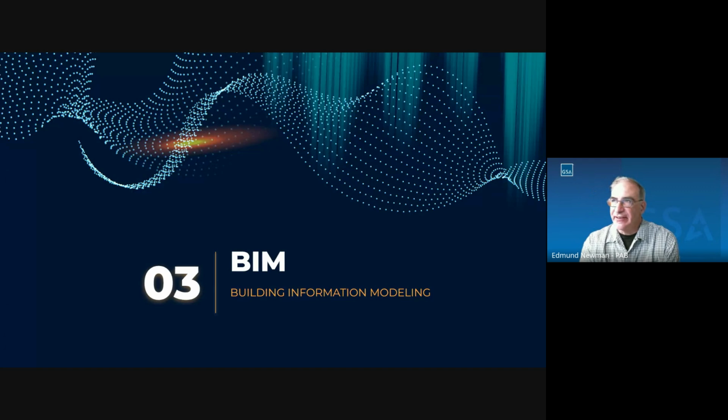I just posted, I think, in the question and answer, a little statement reminding everyone that under FAR Part 27.4 and GSA contracts, energy models and the BIM models and all the other documentation around every one of our projects are considered government property as part of the work, and these should be turned over to the GSA either on the submittal schedule or at least at closeout, and your authority comes from those statements.